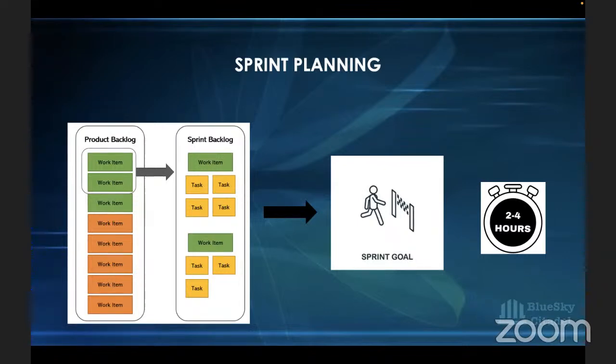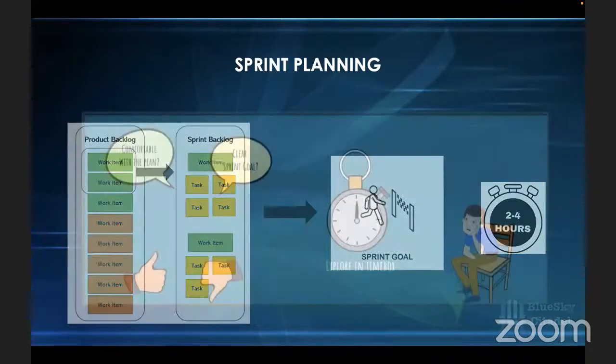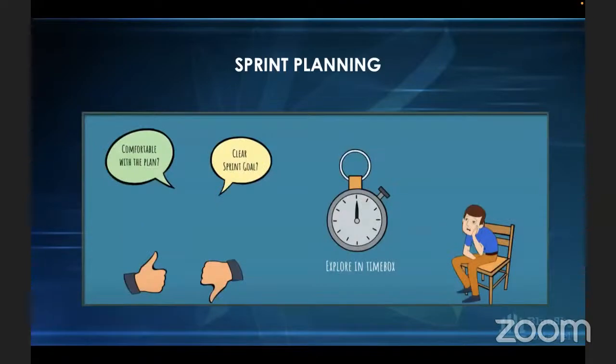It is important to know that it is the developers that should move the product backlog items from the ordered product backlog into the sprint backlog, so that it will encourage ownership of the plan. They will naturally ask questions and have discussions around the product backlog item. Also, the developers should be the one to decide how the work will be done. Make sure that they decide how they want to work on this product backlog item, because it is what they should do. While facilitating, you should ensure that the developers' voices are heard. You can also encourage them to visualize their plan, just for transparency's sake.